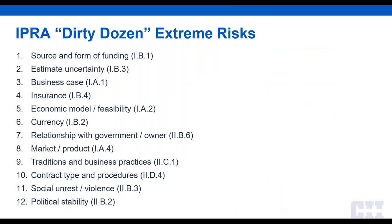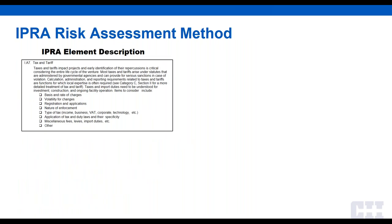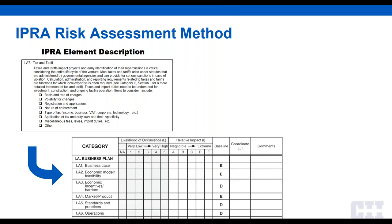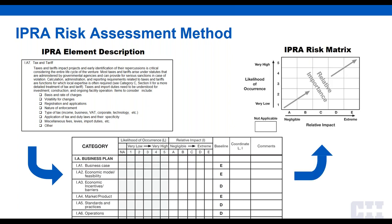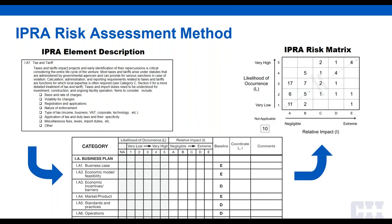There are 12 extreme risks in the IPRA. If you've ever had issues with any of these, you know how serious they are — these are the kind of things that can cripple a project. The tool includes a detailed description for each of the 82 elements. You read the description, discuss that risk in the workshop, then discuss likelihood of occurrence and relative impact, and plot the risk on the risk matrix. At the end of the assessment, you can see how the risks are distributed to get an overall view of your risk picture.